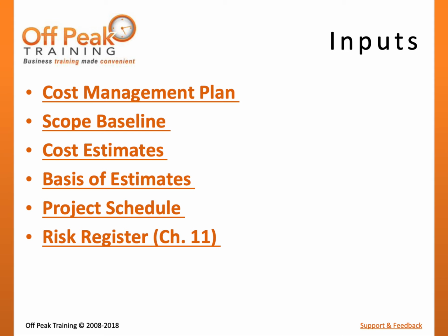Another input to this process is agreements. Agreements are an output from Chapter 12 on procurement management, representing contracts that have been reached with vendors or subcontractors. Once the agreement is signed, the costs can be better accounted for in the budget.